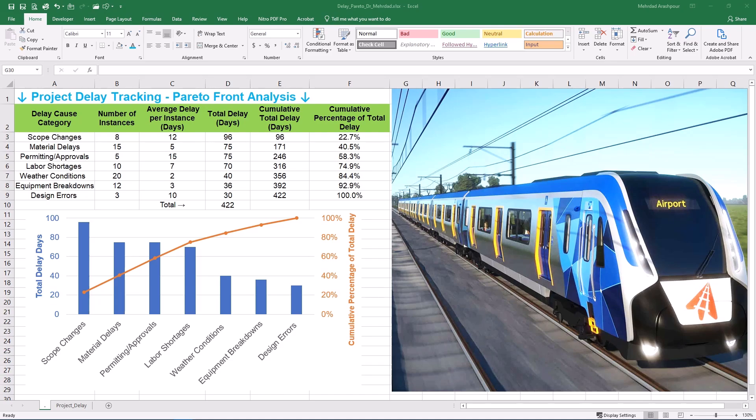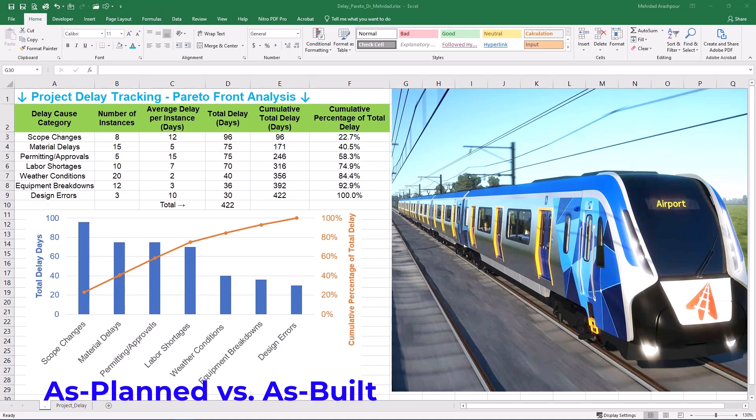First up, the simplest approach is as-planned versus as-built. This method compares your original project schedule (as-planned) to what actually happened (as-built). It's great for a high-level overview — you can easily see the total project delay — but it's limited since it doesn't tell you why there were delays or their causes. It's a simple comparison of start and finish dates and major milestones, visually helpful to show the extent of delays but not the reasons.